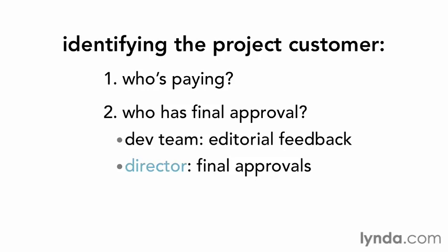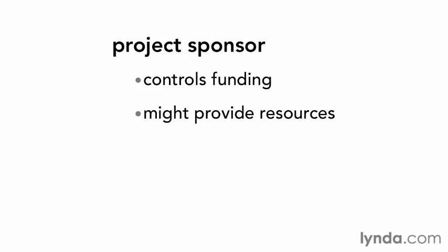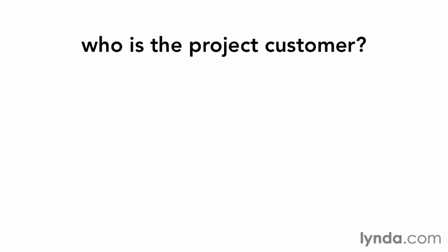If the project customer is a group, you also need to identify the one person with final authority known as the project sponsor. The sponsor controls the funding for the project and might also provide or prioritize resources for the project. Test your customer identifying skills with this scenario.